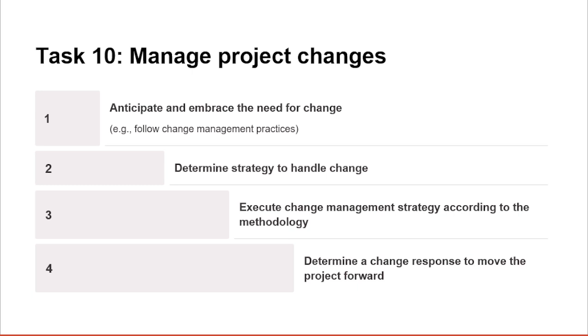So ensure you understand the type of project that you are running. Based on that, you need to determine the process. If it's waterfall, we need to follow the change control process by understanding the impact of the change, submitting the change, getting the approval, and then updating the baselines. On the other hand, agile is different: understand the change, assess it based on its risk and value, and then apply it through iterative backlog refinement sessions, and then it goes to sprint planning and sprint execution. We have already covered this in detail in the agile section.